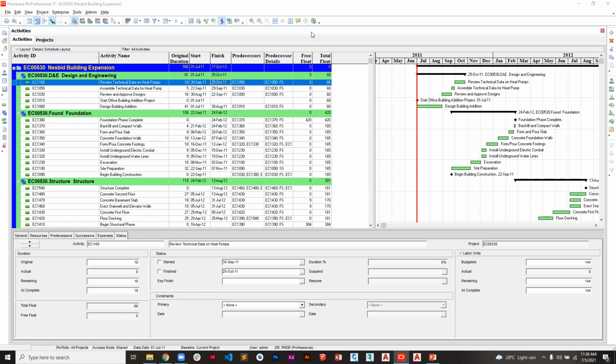Float in relation to an activity is the number of days by which an activity can be delayed. So like the freedom within which you can continue working on an activity without delaying the project. If an activity has 2 days float, it means if the schedule says it is ending on Wednesday, it has the liberty to go until an extra 2 days without delaying the project. That's why critical activities have zero float, because when they cannot be delayed, it means if you delay them, the project schedule will change. That's why they have zero float. I don't know if that's clear. Thank you. Mr. Bright, is it clear to you? Maybe you can send a message.